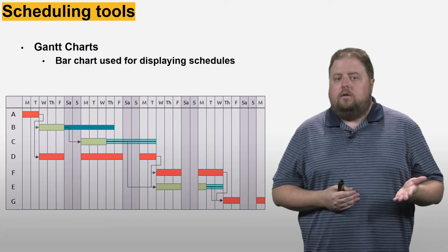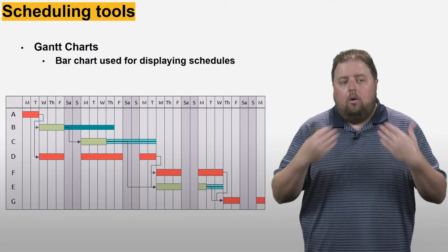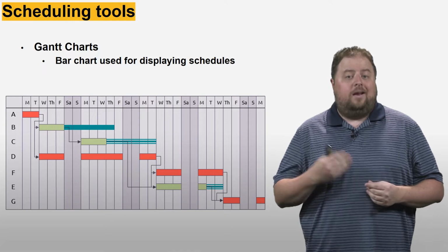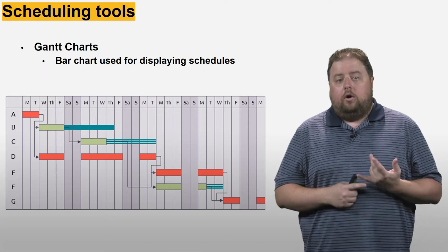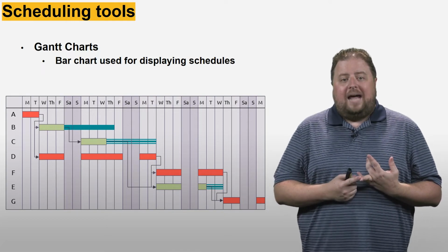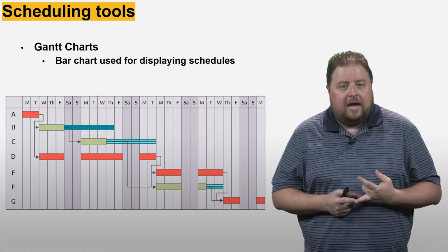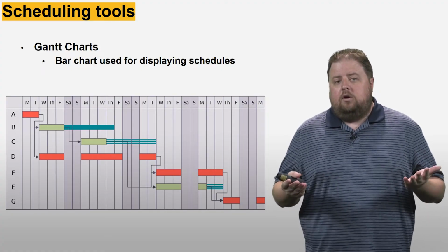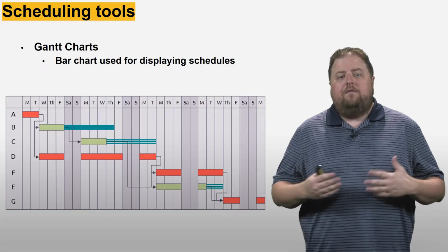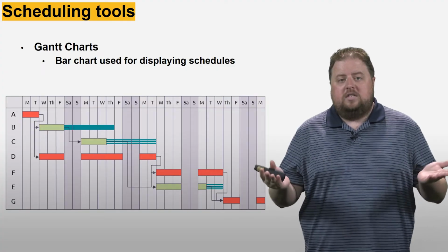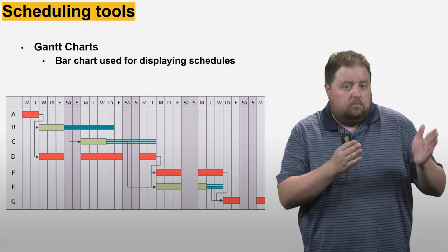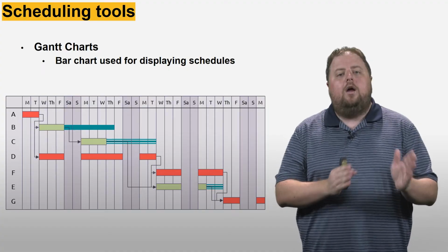So Gantt charts, not only being a useful way of showing a schedule, is also a useful analytical tool to determine the critical path and what kind of activities can and cannot be delayed. Any activity that isn't on the critical path can be delayed, meaning if you have understaffing for employees, you can actually move it a little bit and say, we're going to wait on doing that.